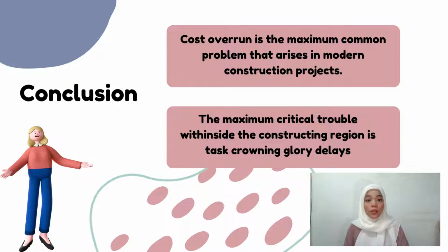However, to reduce headaches arising from the cost overrun, the lump sum building method may be used for this project. This lump sum construction approach calls for the contractor and the customer to agree on a certain amount of cash as a development fee, and the contractor should finish the project in the agreed upon time frame, and the agreed upon quality. As a result, the contractor bears the danger of the cost overrun.